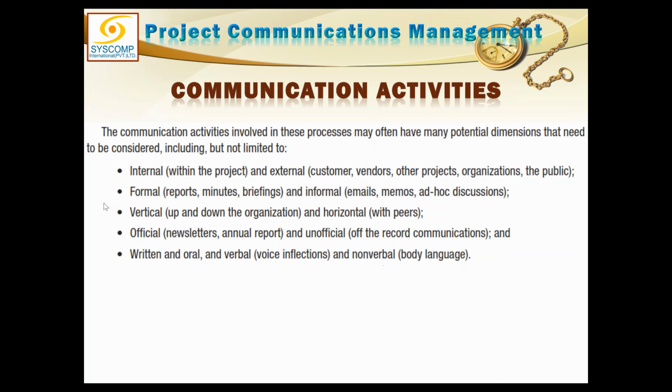Then we can also classify the communication into formal and informal. This is important because we would definitely like all the formal communication to be documented. We would also prefer to have informal communication documented if that could be available as a document. But still, if it can't be, then at least formal communication must be in writing. There are no two ways about it.